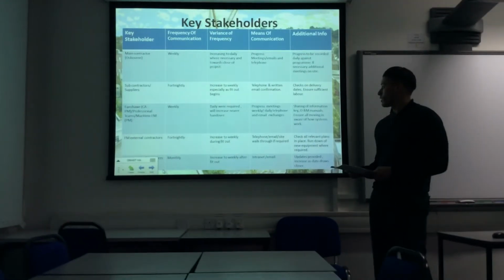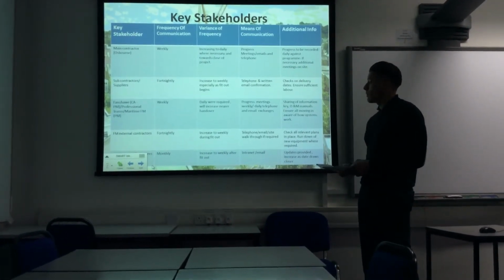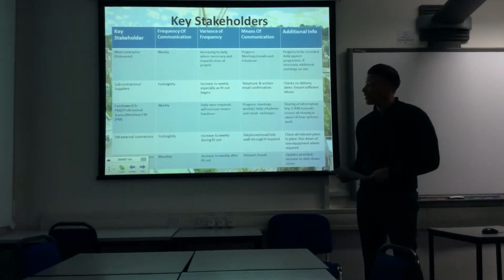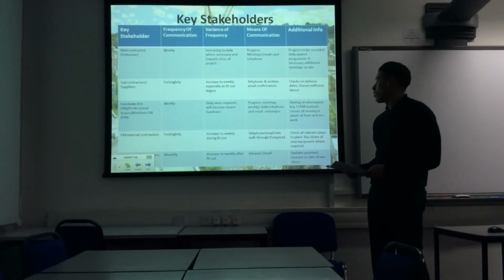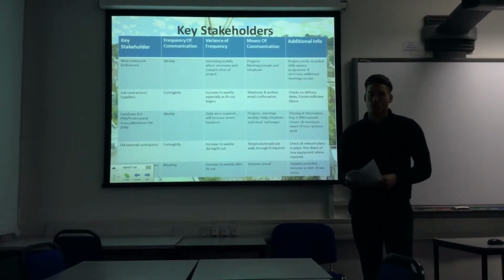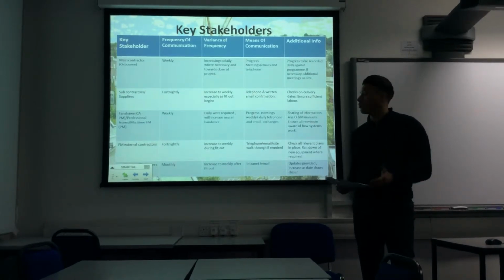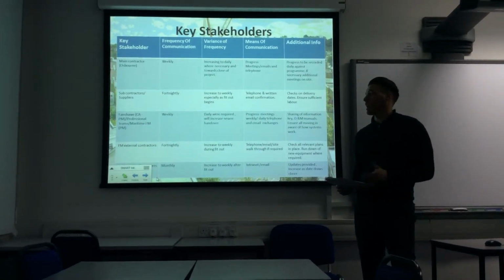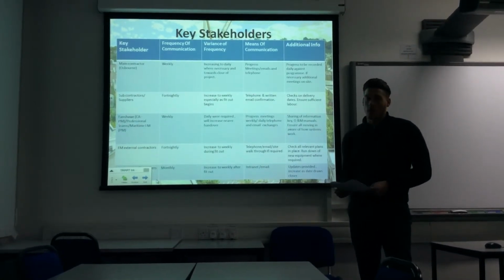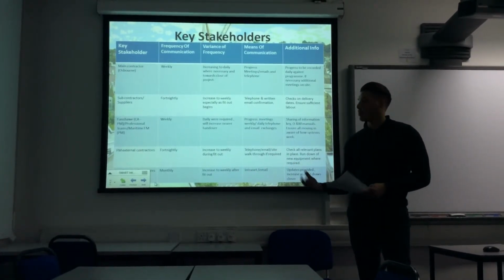This would help share the information, which is key, ensure O&M manuals are ready for handover, and also that a full explanation of all the systems, especially to the maritime FM, is relayed, because as we know, they're going to be the end users of this building, so they need to know exactly how it works. Otherwise, this could cause problems come the migration when the building is actually open.